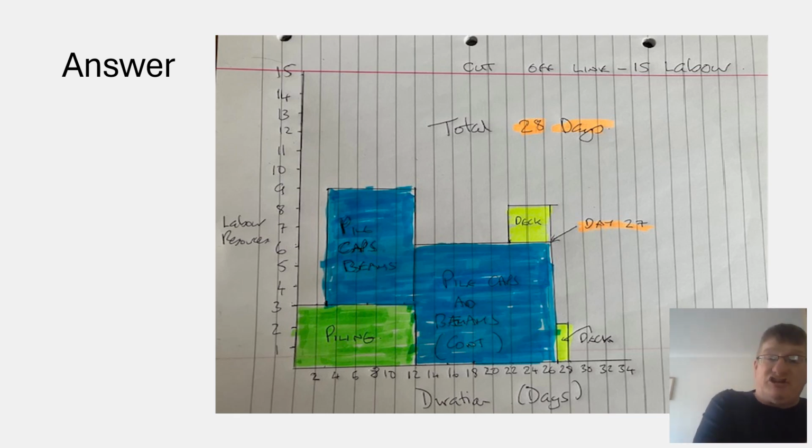There's an argument you could start earlier, but I've put it there, okay. And it's only 2 labourers, so it takes me from 6 to 8. So I'm still 7 labourers below my target of 15.